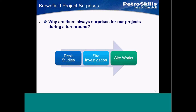Site investigation is basically confirming all the desktop studies. And if you can't find something out from site investigation, then typically you've got to do site works — and a lot of times that involves excavation. So you see the progression: desktop studies — not very intrusive; site investigation — a little bit more intrusive; site works — definitely intrusive.